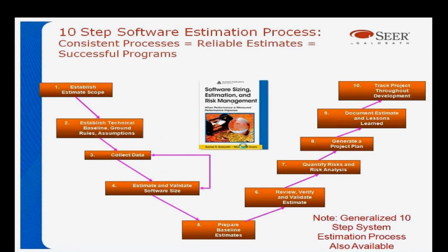The process overall includes establishing the estimate scope. What are you trying to accomplish? Figuring out a technical baseline and ground rules and assumptions. What is it you're going to be building or estimating? Collecting the information to be used as source information for the program estimation.